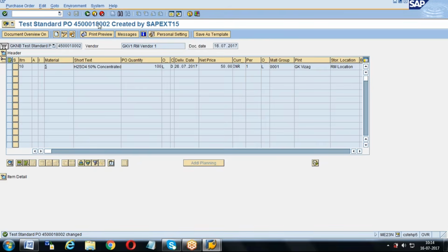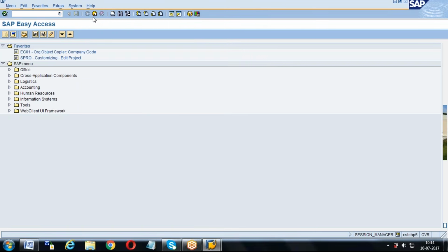After pre-sales has worked on it and we won the project, we got the estimation and also the budget: how much budget we got, and how much estimation of work. In that estimation of work, they will give some kind of scope of work, like how many company codes and plants. Our key areas are warehouse or inventory operations, finance, and also sales.